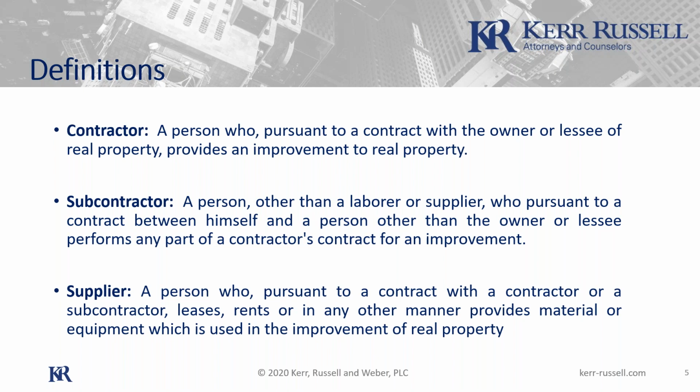And that's in a situation where you are in direct contract with the owner. So sometimes when there's a construction manager, and it's the type of construction manager we call an agent, construction manager agent, where they kind of have a contract off to the side with the owner, but the owner holds all of the trade contracts directly with you, folks like you. That would be a situation where under the Lien Act, you would actually qualify as a quote-unquote contractor. In my experience, that's usually a little more on the public side, like university work. It seems that the Bartons and the Wallbridges managed to just have a construction manager agency relationship with the owner, and you have a direct contract, so you can't really lean on those.